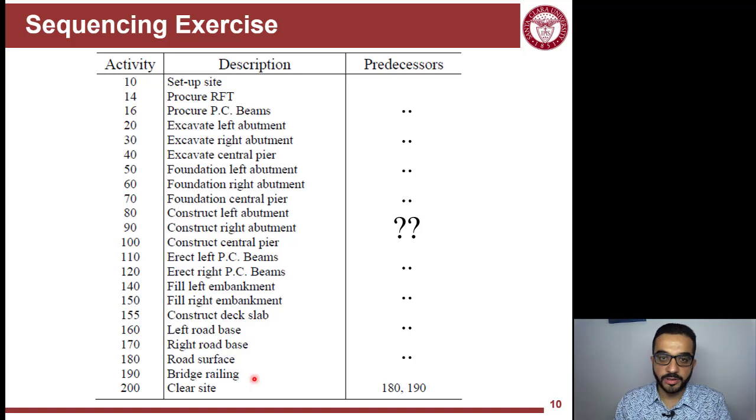They are dependent on the bridge itself to be done, and also the quality. You don't want to put the road surface and then have heavy equipment with dirt and all of that affecting its finished quality at the end. So it's your exercise. We'll discuss this in the class to continue the reasoning backward.